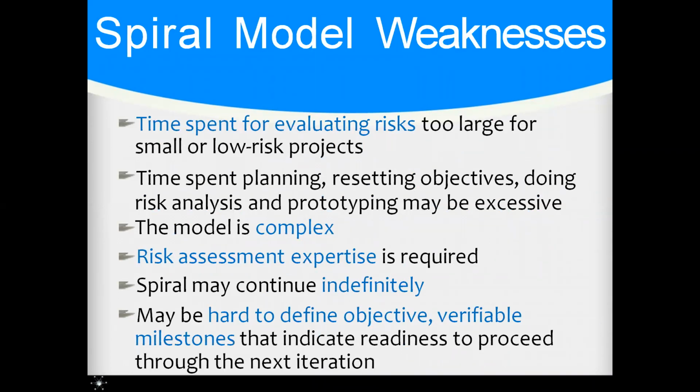Time spent evaluating risks is too large for small and low-risk projects. Yes, that's one of the issues there. Then time spent planning, resetting objectives, doing risk analysis and prototyping may be excessive. You know, the cycle keeps going. So it can be so tiring. So most times this model does not work for a one-off customer that is not really paying you so well.